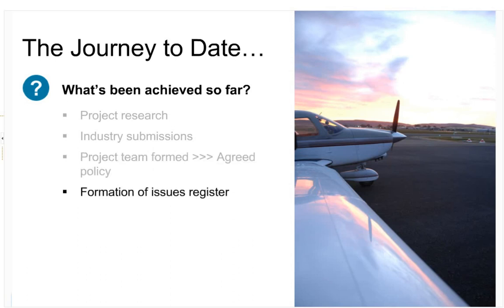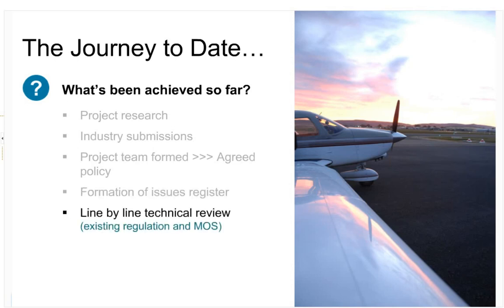What we then did was we formulated an issues register with various challenges being faced by both CASR and industry with the regulation, as well as the manual standards Part 139. That then led to a line-by-line technical review of the existing regulation and the manual standards, or the MOS. Now, not to put a fine point on it, we actually went through every single clause and provision of both the regulation and the MOS, trying to understand its outcome, that is desirable, and also its regulatory intent.